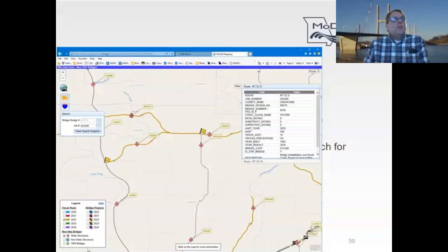The reason I show you this tool is so that if you have this paving project, 5S3346, your designers can look at this and say, okay, we need to deal with bridge number X0205, X0206, and all those other bridges. So contact our structural resource manager, David Hagemeyer, or if it's in a particular county, you can contact the project manager associated with that county. We can have our staff look at those bridges and say, don't pave over this bridge, you need to modify the guardrail ends on this bridge, and all that stuff.